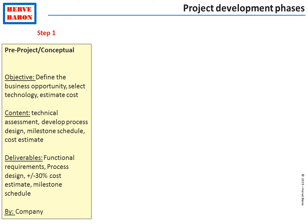The main objective is to define the functional requirements of the project, as well as to obtain a preliminary cost estimate of the investment. This step — step one — is sanctioned by a decision: a decision to go forward into step two or not.